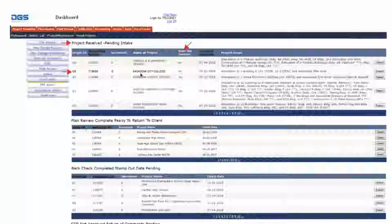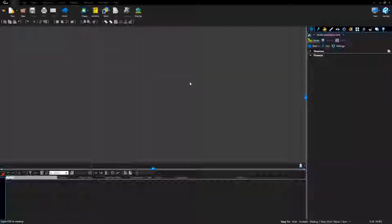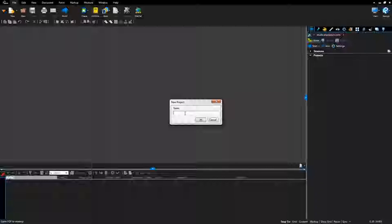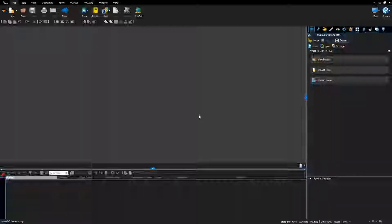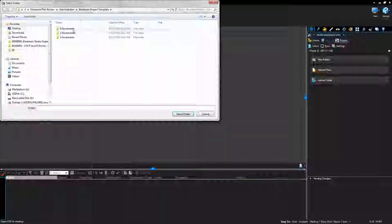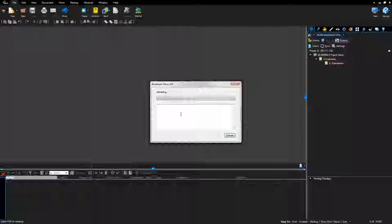Right-click and select copy. Return to Bluebeam Studio, click Home, then select Start. Select new project from the drop-down menu. Paste the eTracker information into the project name and click OK. Go to Bluebeam Studio Project and click the upload folder button. Under the Studio tab on the X drive, go to the Electronic Plan Review folder, into the Administrator folder, and then into the Bluebeam Project Template folder. Select the folder to match the number of increments the project has. Select folder and the Bluebeam Studio Project folder structure will upload. The increment number is shown on the eTracker dashboard project received pending intake bins.